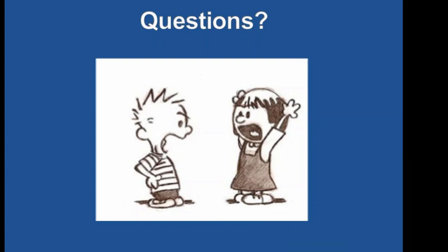This is more of a clarification question, but it's an excellent question. In hackathons where participants don't usually know each other beforehand, what advice do you have for getting teams to form? This is a place where NIH hackathons really diverge from other types of hackathons, where teams slowly form organically. What we do is pre-scope the teams. We ask people in the application form to cite the three teams they'd most like to be on, and also tell us a little bit about their scientific as well as coding experience. Based on that and some of the other factors I mentioned before, we pre-assign people to teams.